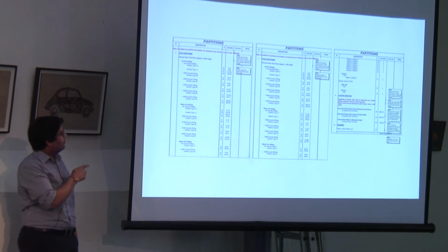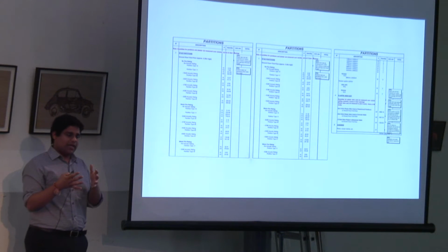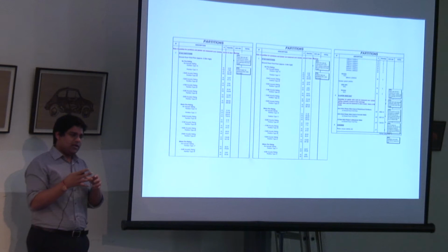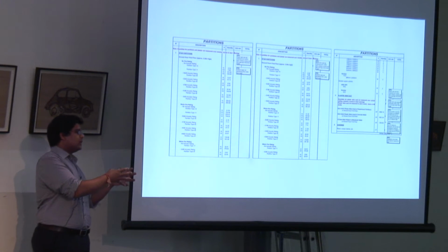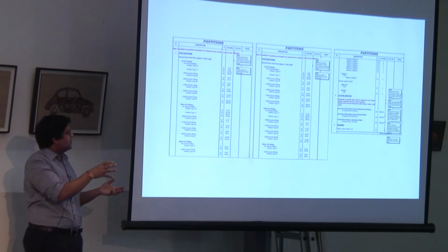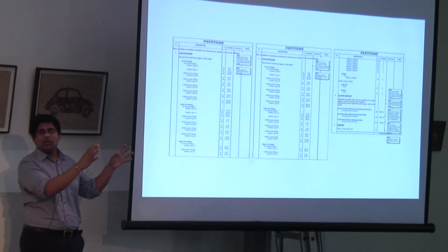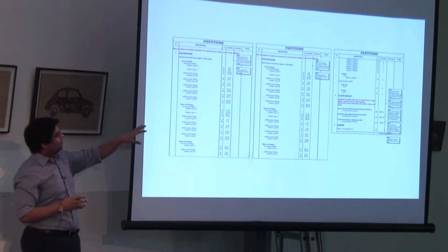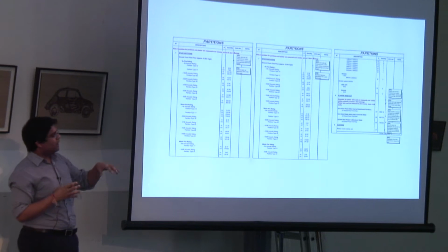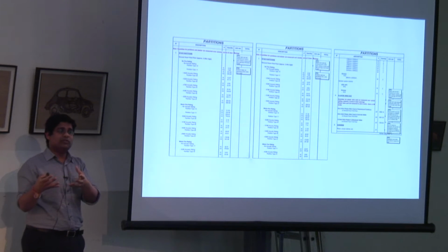I mentioned cost. We've done a couple of exercises with various cost consultants. What we found is about 50% accuracy, and that's really due to the fact that the way the QSs are measuring things is very different to the way the software is measuring it. Software would measure exactly how much plasterboard is in that wall, for example. The QSs might just measure the whole wall. So what we found out, all the tabs in yellow, for example, are things where we had to understand how other consultants and practices actually measure things or use the model.